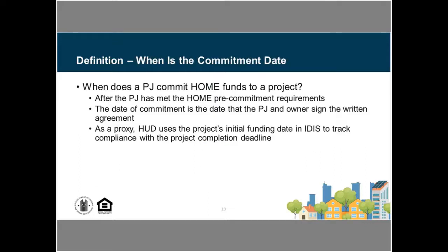Let's talk a little bit about the commitment date. So the technical commitment date for our project is when all the conditions have been met to have a commitment of funds, and we'll review those kind of quickly in a minute, and that written agreement has been fully executed between the PJ and the owner.